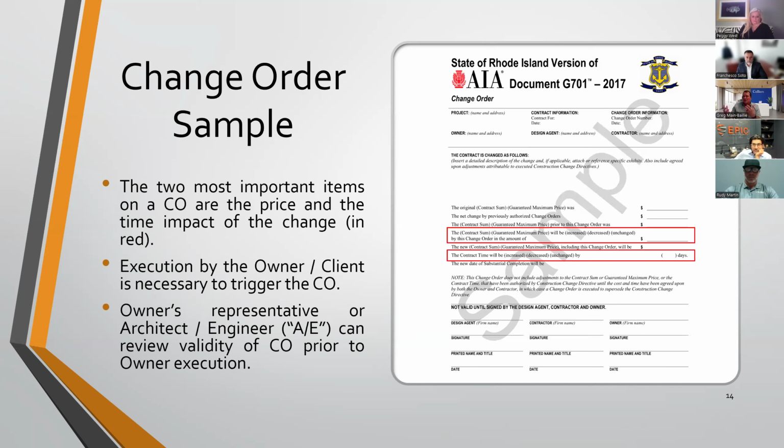Concrete restoration is a little bit of a nuance because, as you heard Rudy say, the big term is unforeseen condition. And until your engineer and engineering inspector are actually on the building, tapping acoustically on the stucco or the reinforced concrete to understand the severity of delamination, you don't have a true quantification of those line items. So typically through the design process, your owner rep will sit down with your engineer before they take the plans out to bid, and literally go through the